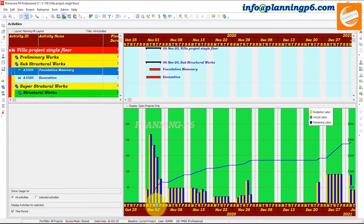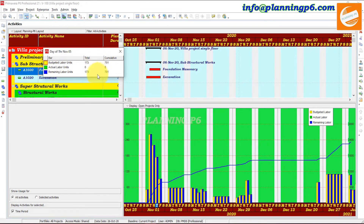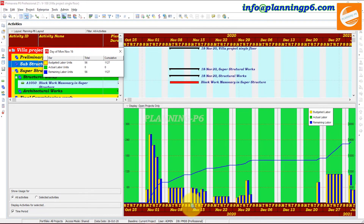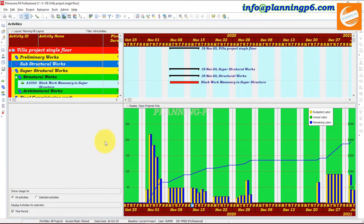Whichever time period or day you select, the duration will be shown here. If you double-click here on the same one, you can see a table showing the date — for example Thursday, November 5 — with budgeted units, cumulative, actual labor units, and remaining labor units. You can view by this vision as well. You can see the total units and remaining units.